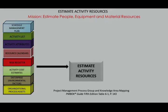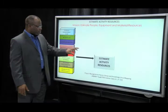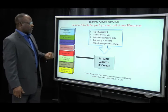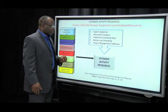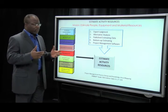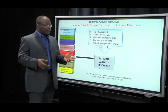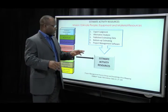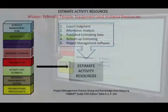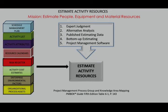We've also got EEFs and OPAs. Looking at our tools and techniques, we've got expert judgment, alternative analysis — looking at the different alternatives for carrying out the work. Should we use Phil or someone else who's more skilled, keeping in mind it costs more? Published estimating data looks at data routinely published by trade organizations and firms to give an idea of what it would cost for certain standard labor tasks and certain resources.